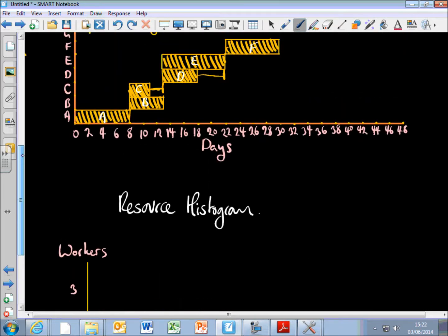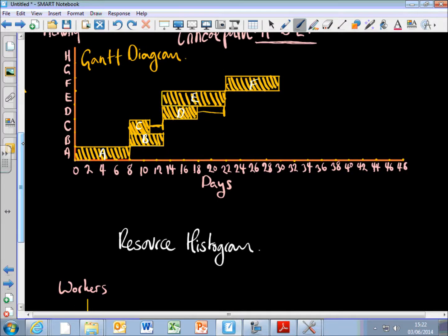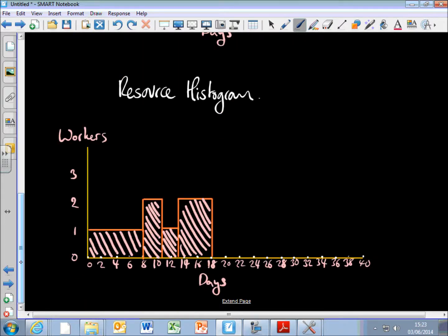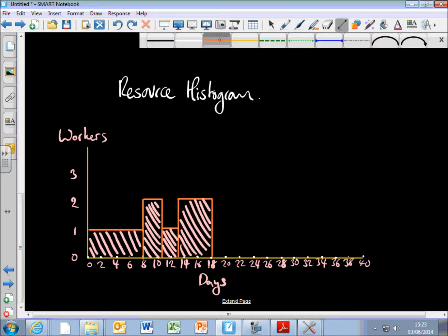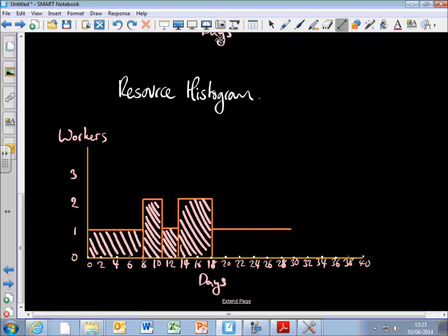That, and then finally from 18 I'm going to be doing job E up until day 22, and then I can start job F from 22 to 30. That's still only going to take one person because I'm going to go from one job to another job, so I need just one person employed from 18 to day 30. Okay, so that there is my resource histogram. Okay, and it's basically just showing me how many people I need to employ for different days.